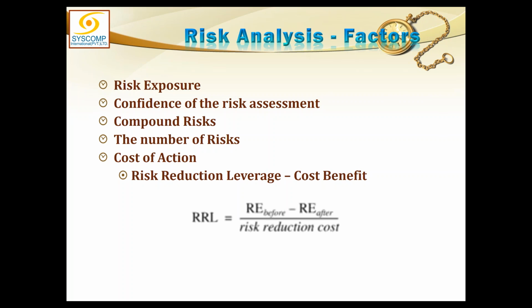You see, there is no fun in having that situation. The only viable option here is that your risk reduction cost must be less than the reduced exposure. If it is less, then it is feasible, but it depends upon your policy how much less is acceptable to you. So you have to take only those actions which benefit you optimally.